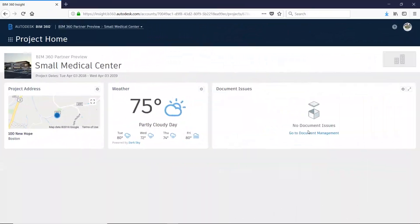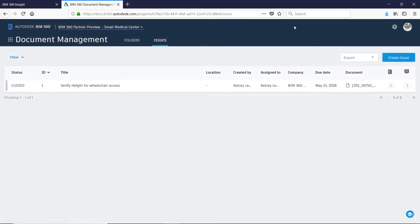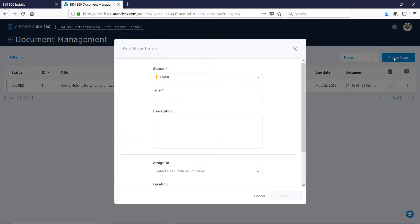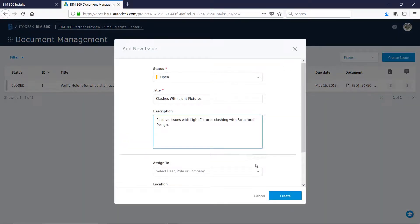Using BIM 360 docs, the local project manager creates an issue and assigns it to the appropriate member of the MEP team, along with a recommended due date.